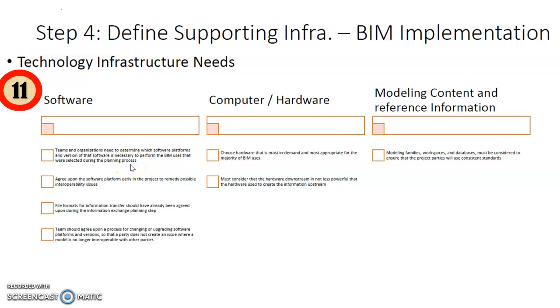For example, in step 1, right? Or agreed upon the software platform early in the project to remedy possible interoperability issues. Or file format for information transfer should already be agreed upon during the information exchange planning step. At least ensure that the output can be .ifc.